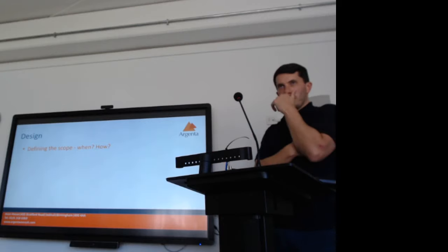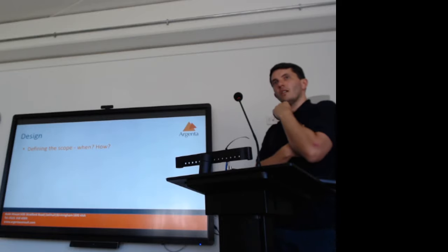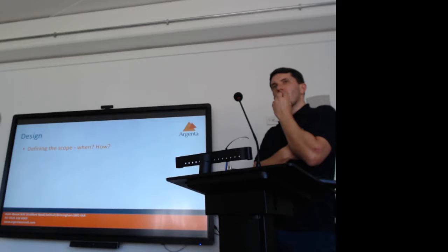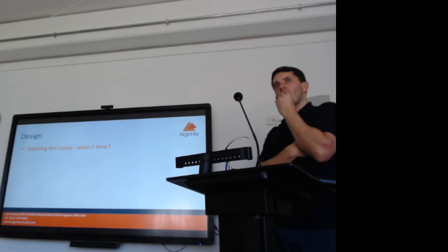So in the embedded world, it might help you a bit more. We work along the lines of a company called VBAS who do embedded C, C++ training, and they are very good with use cases, use case scenarios, to develop your requirements. So user stories: you get your user story from various different perspectives, and then you get your use cases and find your requirements. It seems really abstract and out there, but it does depend if there are lots of different users, lots of different use cases, but you can get a very tight specification from that because the customer has to talk through all these different scenarios.